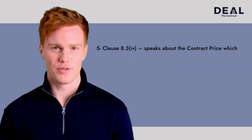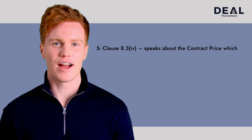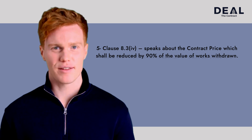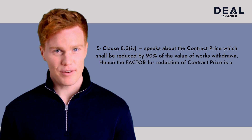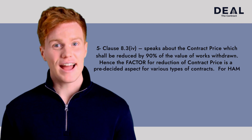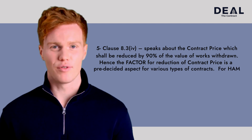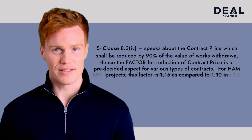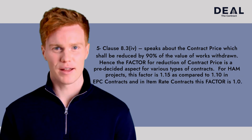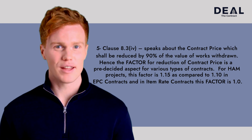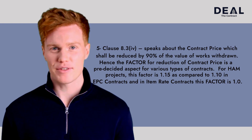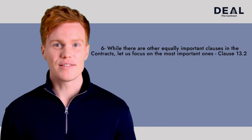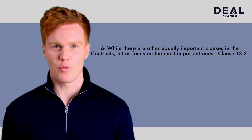Fifth, Clause 8.3.4 speaks about the contract price, which shall be reduced by 90% of the value of works withdrawn. The factor for reduction of contract price is a pre-decided aspect: for HAM projects this factor is 1.15, compared to 1.10 in EPC contracts, and in item rate contracts this factor is 1.06.